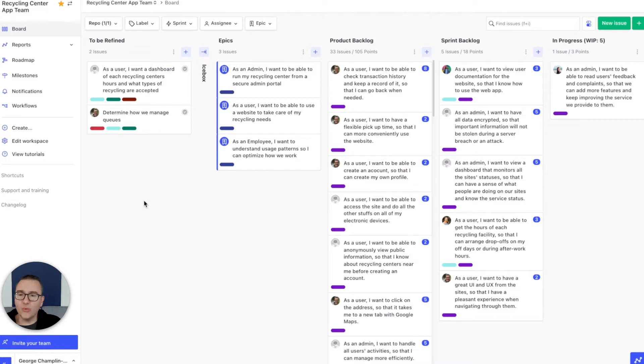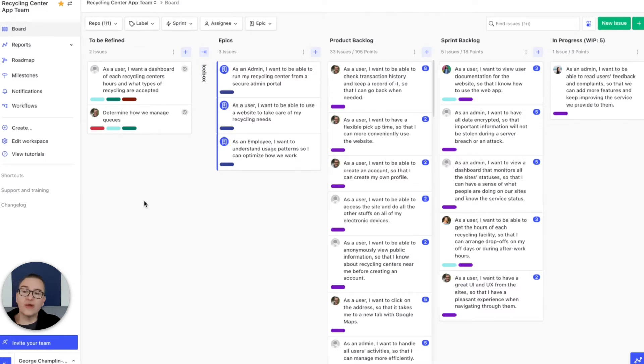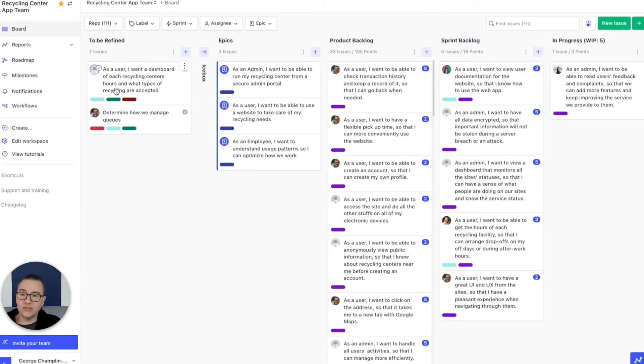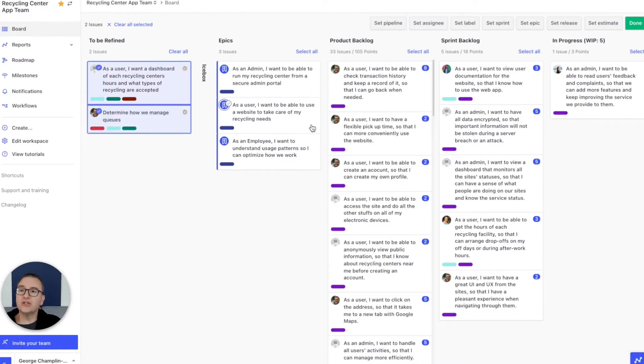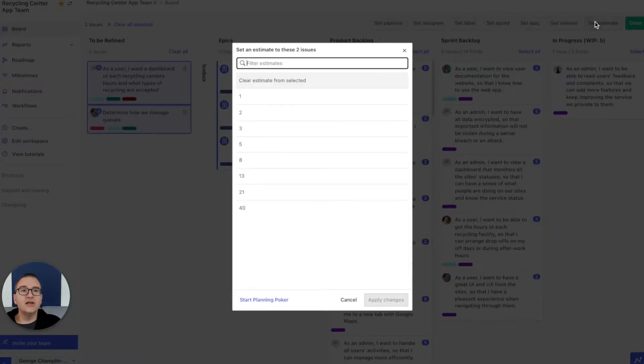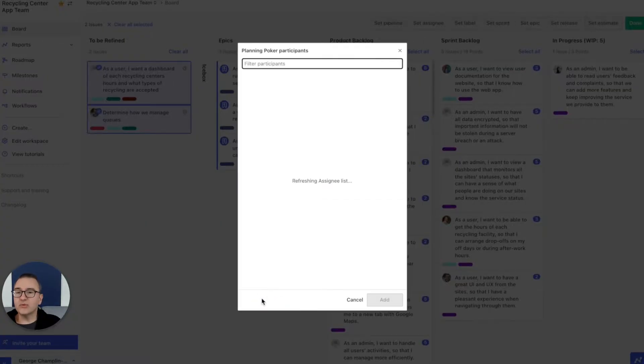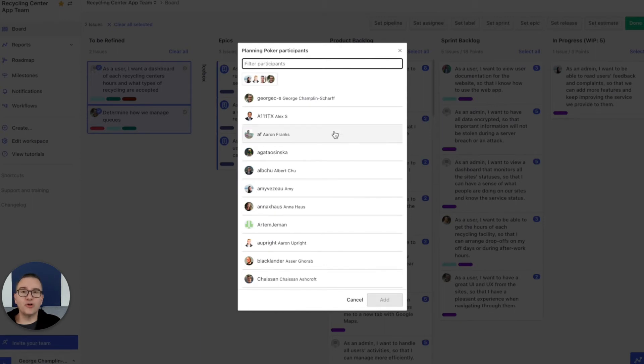It turns out there's a great way to overcome this. ZenHub adds automated asynchronous planning poker to GitHub. So let's select a few issues, let's click Set Estimate, we'll start a planning poker session, we'll pick our team.